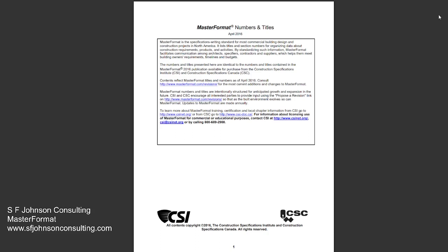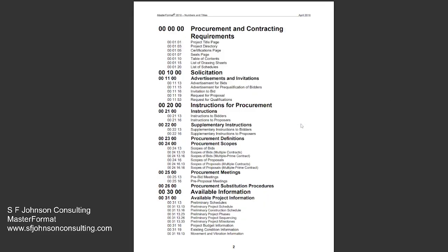And so if you have to think about the construction documents, you would think in this way. The construction documents are pretty much the written words that go with the pictures. And so every time you see a picture, you're going to have something related to that picture in the specifications. And so they're ordered in a sequence of three component 2 digit numbers. And so all of the zeros are pretty much paperwork, submittal information, scope of work, all of that type of information. So that's pretty much all the zeros.